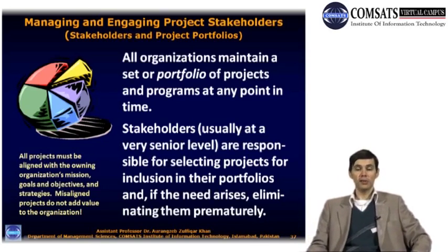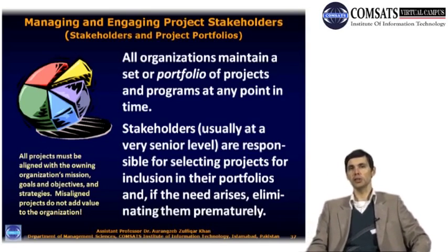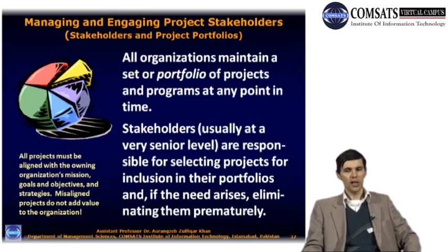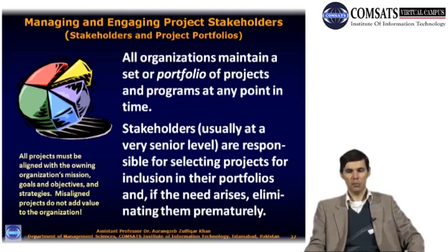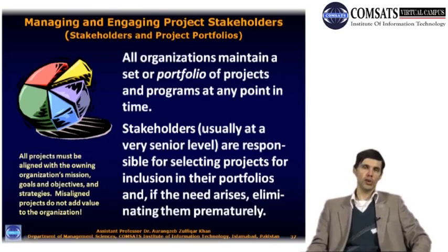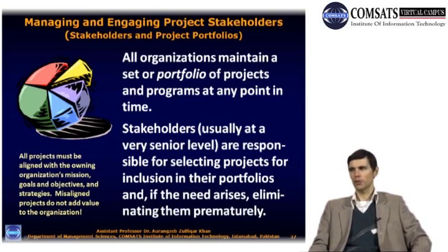Again, it's the stakeholders, in this case usually those sitting at a very senior level, executive directors, divisional chiefs, the CEO, boards, etc. They are responsible for selecting projects for inclusion in their portfolios, and if the need arises, for eliminating those projects prematurely, for instance if they no longer serve a purpose, or if they're going to cause loss rather than bring benefits.